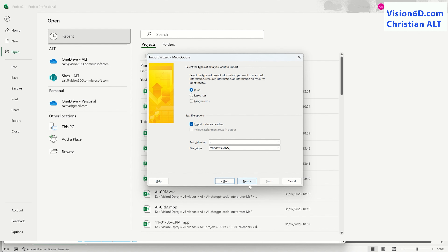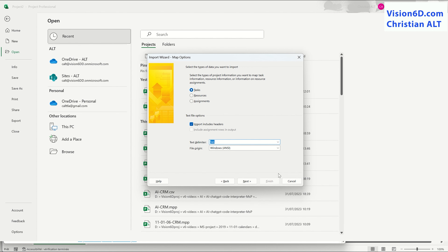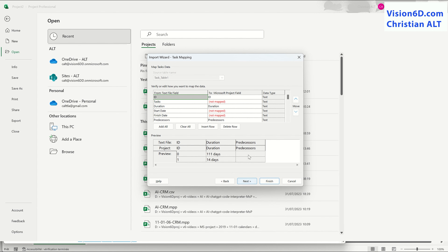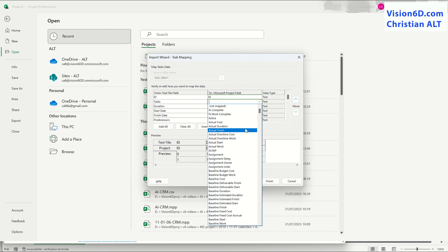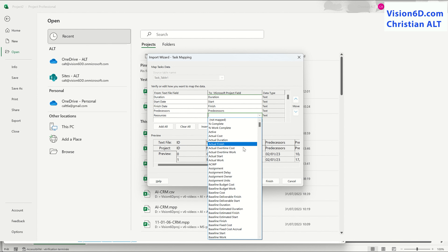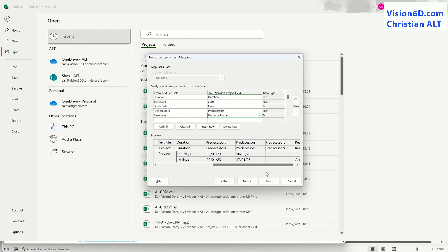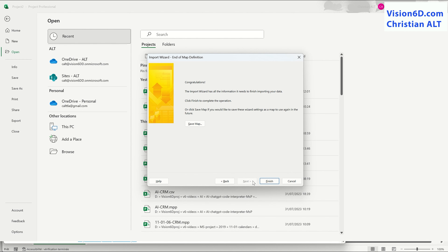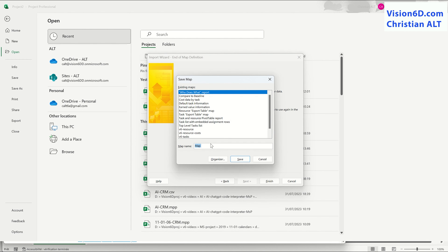Now, the importation procedure is defined in another video, but here what is important is to define the delimiter as being a tab. After that comes the mapping of the data. We have to map each field between the CSV file and MS Project. I can save the map for further usage, and it's what I'm precisely doing right now.